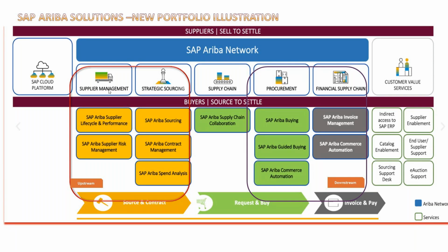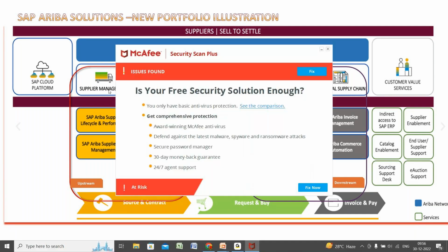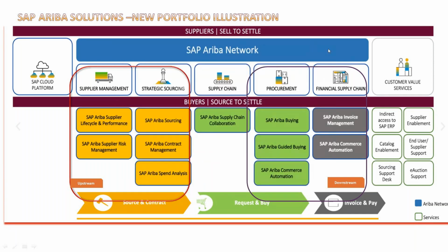Here, when the project starts, everybody thinks this is our project deadline, and this time will be go live. But if your project lead has forgotten this very important activity, you will be focusing only on the template configuration. You'll be showing everything in the system, but you forgot to manage this activity. It will be very difficult for them, because at the end, the system is going live, but the suppliers are not there in the Ariba network.